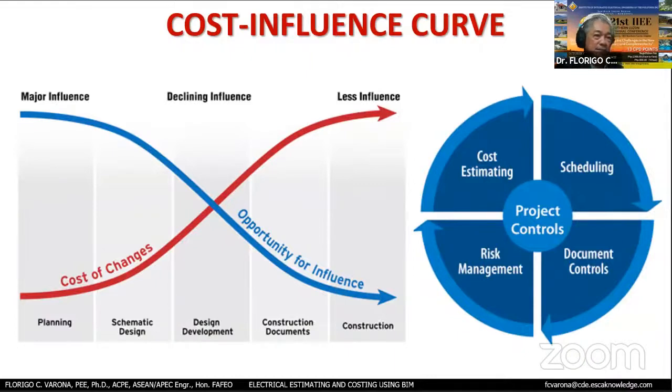stage. Once we have already started the construction, then it will be costly to have changes, particularly if we already have electrical installed already, or we already have fabricated the panels and so on, so it will be very costly. So that's why we introduce doing and resolving all the clashes, design and constructability issues and changes that the owner would like to undertake during the planning and schematic. Show them the project visually using a model. So that's how we do it.